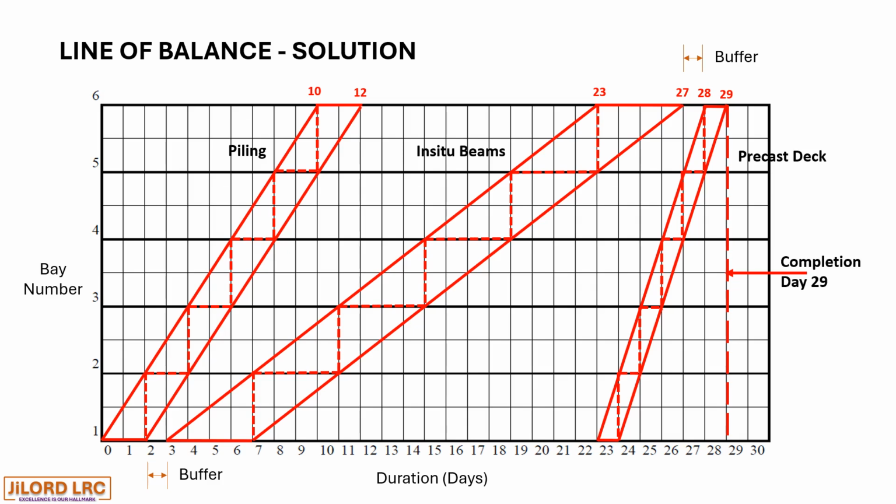These activities are repetitive, so if you use a set of gang to do the first work on the first day, you move the same gang to the next activity, whilst a different operation starts from what has been completed by the operation of the first activity. So this is how the line of balance looked for the 3 operations we looked at.